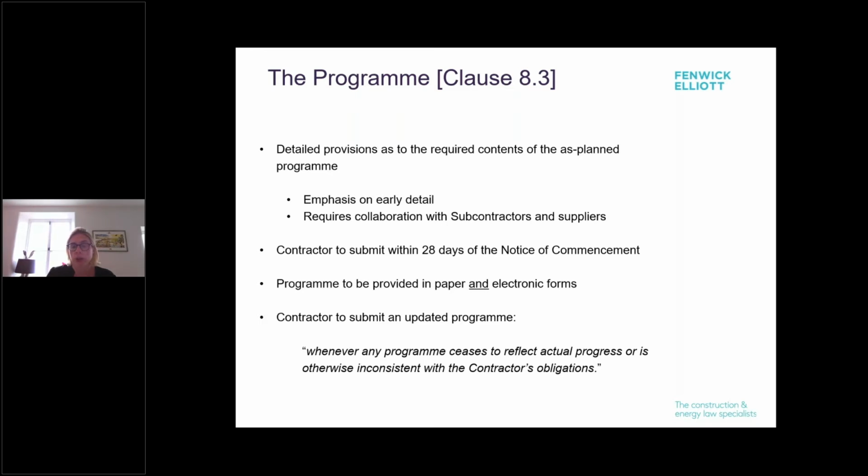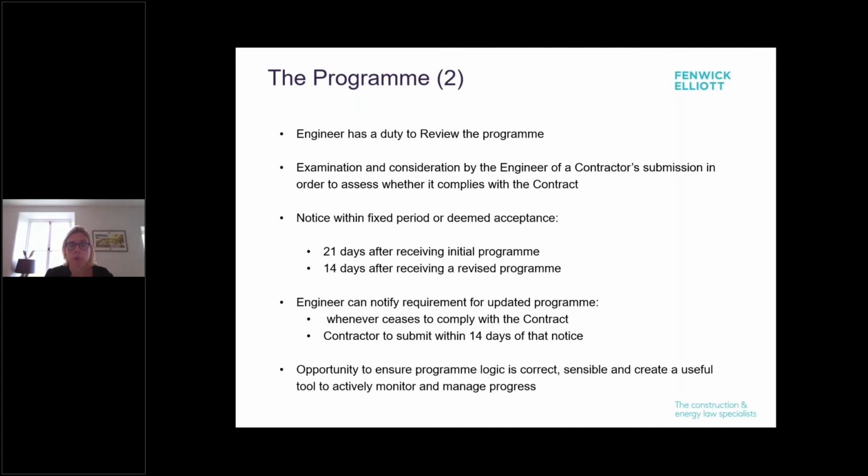The contractor also has to submit updated programmes whenever they cease to reflect actual progress or are otherwise inconsistent with their obligations. So how does the engineer fit into that? Well, they have a duty to review the programme and to consider to what extent it complies with the contract. And I'd say that's quite an important thing to do really thoroughly right at the beginning, for a number of reasons.